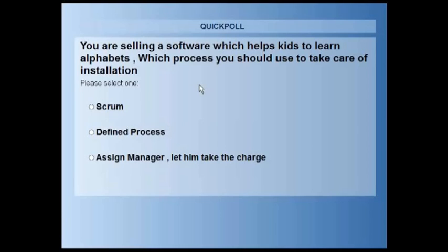If you are in an aircraft project or a satellite project, the cost of change becomes higher. So your exploration cycles of flexibility will get reduced. Even if you are implementing Scrum values, inspecting, exploring, adapting, and doing retrospectives is always good.